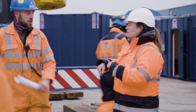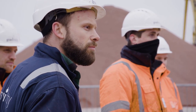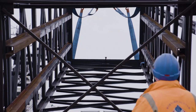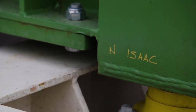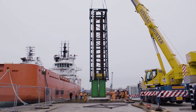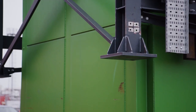So on the civil engineering side, again, it is around control, us having a very good relationship with the contractors. And as we grow and as our capacity to build projects around the world grows, it's all around the ability to do civil engineering works. So how long would it take you to build, say, a 10 megawatt system? For these first projects, we're looking at an 18-month development time, which we're well into, and an 18-month build time. And in future? 6 months and 6 months. So about a year from decision to build to commissioning.